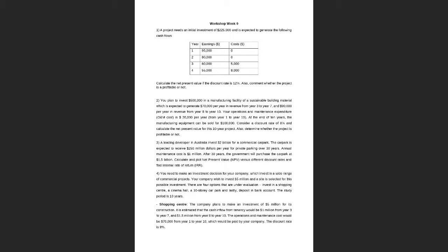Okay, Emiliano. So first what you have to do is find the net cash flow for each year. And once you get the net cash flow, for discounting the future value to present value, the discounted cash flow formula is your cash flow divided by 1 plus R, R is your rate, to the power n. Yes, so future value divided by 1 plus i to the power n. Yes, exactly. So do this for each year and then just add it up together.